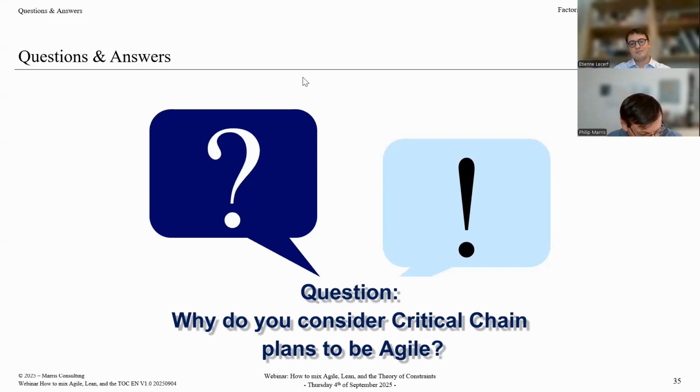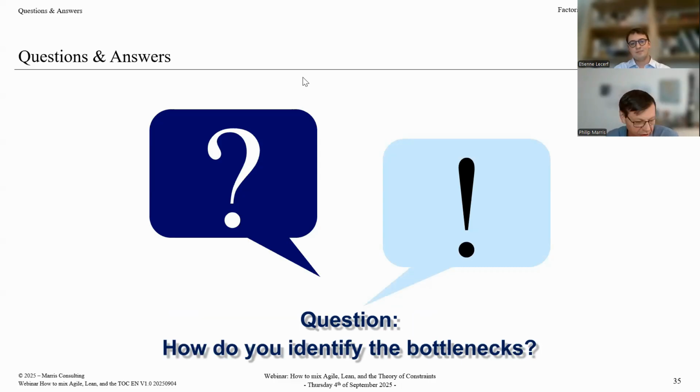So I'll finish off with this question: how do you identify the bottlenecks? Kanban boards can be of great help, provided they map several teams and several projects. Like in manufacturing, you chase queues of work, and Kanban boards make work visible. If you see queues, thanks to the Kanban boards, then you can identify your bottlenecks.